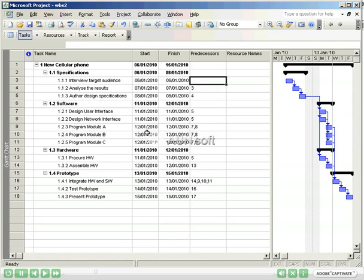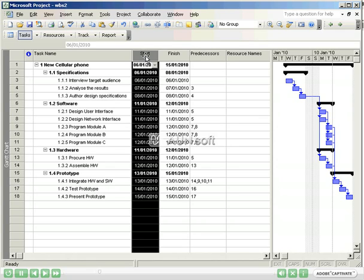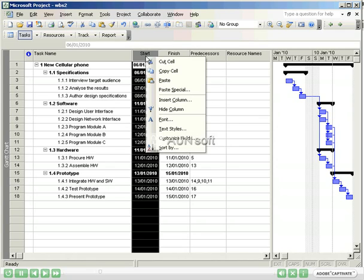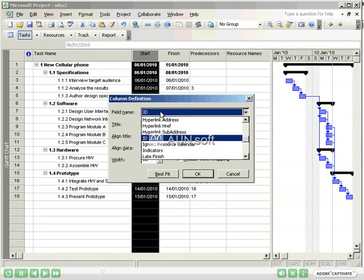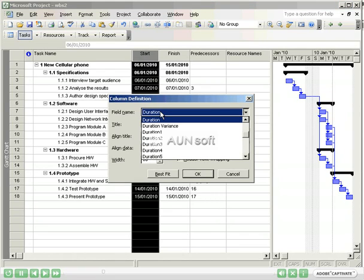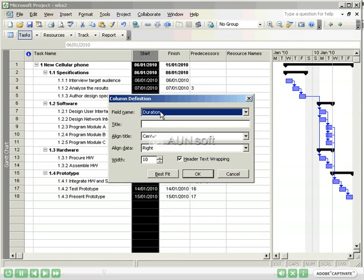To enter duration, you need to expose the duration column. To do this, select the column to the right of where you want the duration column to appear. Right click, select insert column, in the field name field, search for duration, select it, and press OK.